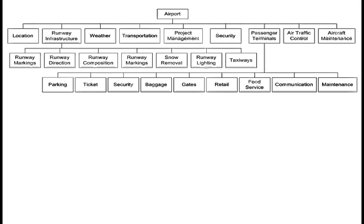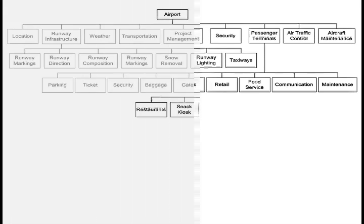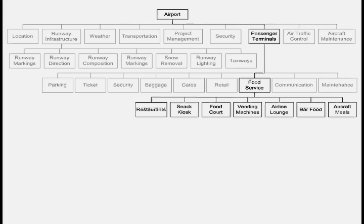If you broke down passenger terminals, you'd end up with things like parking lot, ticketing areas, security inside the terminal, baggage handling, gates, retail stores, food service, communication systems like the PA system for announcing flights, and building maintenance. Further decomposing food service, there would be things like restaurants, snack kiosks, food courts, vending machines, airline lounges like the Admiral's Club, food served at a bar.